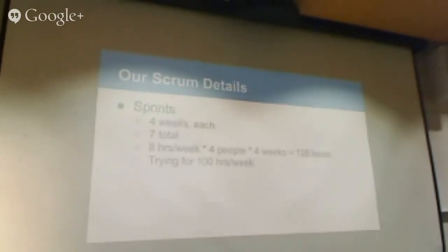So the format of our Scrum, I guess, is we try to do 4-week sprints. We initially came up with 3, and we tested that out a little bit during the early phase of the first sprint, and we didn't really get everything in that we wanted to, so we had to push a bit to the next sprint. So we talked about it and realized that, especially from the beginning, it would be necessary to have longer sprints, and that seems to be a lot better now.